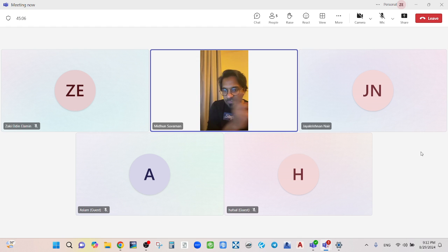So all these, whichever I explained in our previous session about the contract, you think from the first point in that perspective: third party, surety, guarantee, contract, consideration, capacity. Then only you should go through what is the contract amount, what is the percentage, what the bank is telling, what is the validity, is it unconditional, is it irrevocable. Sometimes, guys, be mindful, the bank will smartly put in some extra clauses. Don't ever entertain that. Tell them no, I never agree to this, I need a format the way I want. You pay whatever amount to the bank, that's your headache, but I need a guarantee my way. Clear?